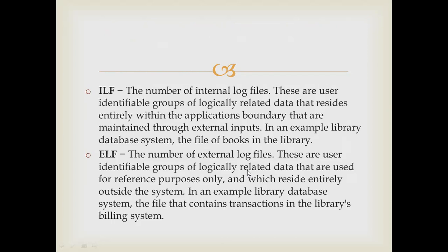Next is internal log files. The number of internal log files: these are the user-identifiable group of logically related data that resides entirely within the application boundaries and is maintained through an external input. For example, in the library database system, the file of books in the library. The file of how many books there are, which we will maintain or document, is a logical group of files. If there are science books, then one file will hold all the data of the science books. This is nothing but internal log files.